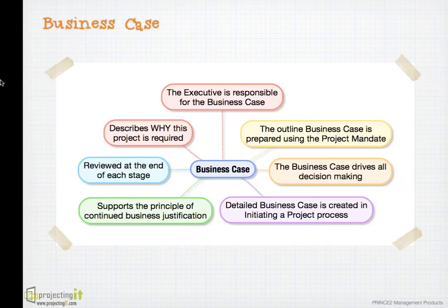It also compares the cost of delivering the solution with benefits of using the solution to see if the investment is worthwhile. We have business case created first cut in the starting up a project, but thereafter it is used throughout the project and it is reviewed, updated and maintained. It is used to decide if the project is justified to continue.